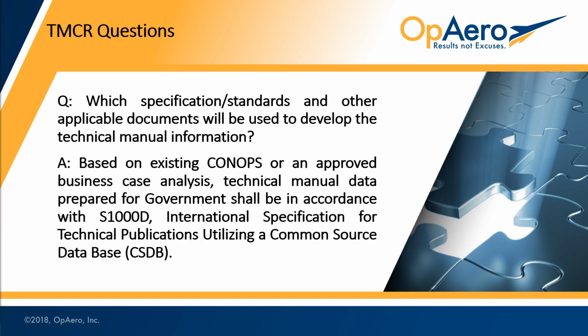This is where you would put MIL-STD-3001 or MIL-DTL-81310, or whatever spec you're trying to have your contract, or your data, written to. And then any other specs that you want the development team to adhere to. If you want to lay in the Simplified Technical English spec and some other QA specs, a 604 manual, and so on and so forth, you would put that in this section.